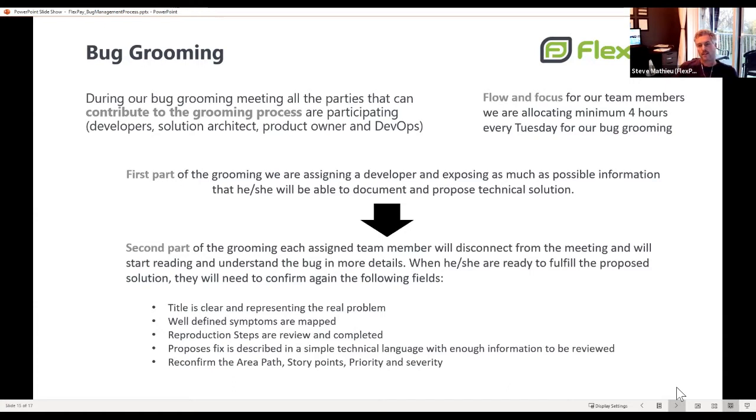So we tried different ways to keep the capacity, and the rules that we have: don't start working on a new bug after 4 hours. But if you are already investigating one, stay on it until you finish. Yes, when you start for the first time, the process seems a little bit too heavy because all the bugs are so easy. You clean them up and it's very easy. But when the complexity of trying to reproduce and understand gets higher, that's where the problem starts, and that's where you need this kind of process to make it work on that complexity.